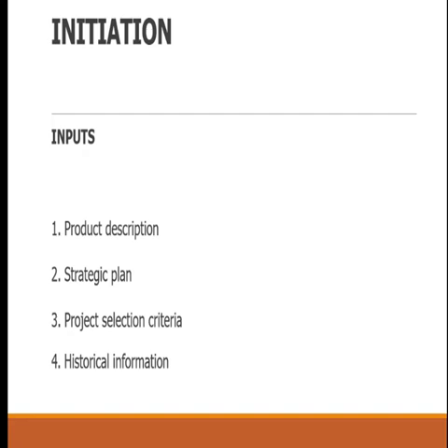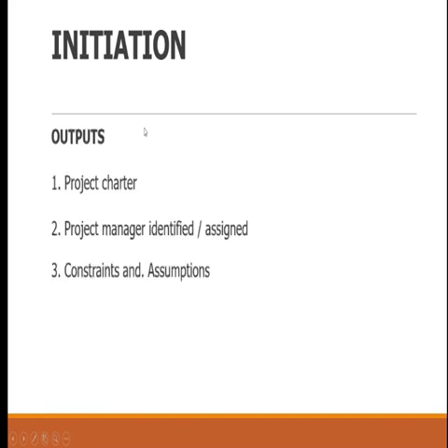Okay, so that's initiation. How do you initiate? 3 things. You must know your input, you must have your tools, then you must understand the results you are supposed to produce. First, let's go to the results. It will give you a lot of understanding. Look at the results of initiation. Anytime projects are initiated, the first thing you see is that the project charter is given. I'll explain this later, but just follow me. Number 2, during initiation, the project manager is identified and assigned. These are the reasons you need to initiate, because it is during initiation that authorization is delivered.